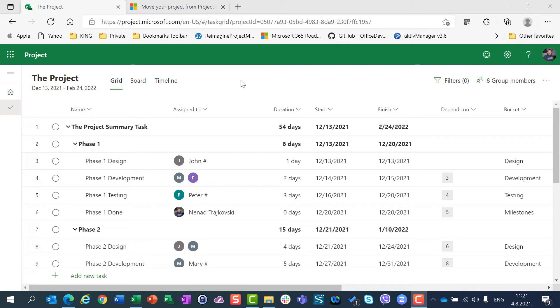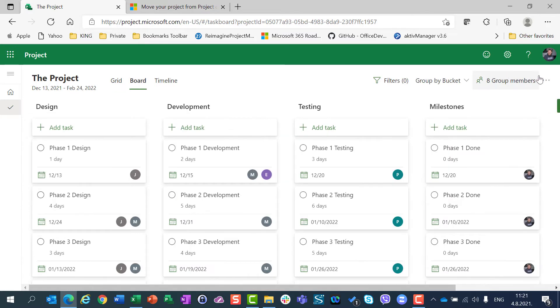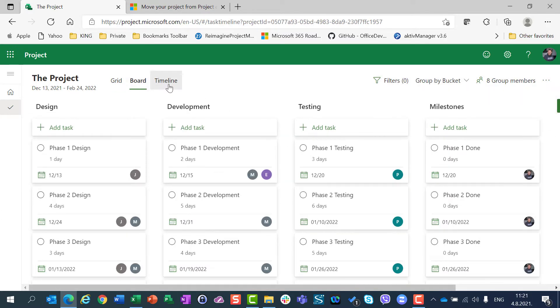For that, you should be aware that the only option to export timeline to PDF is not here in a grid, not here in a board view, but only, as you can see, only in timeline.